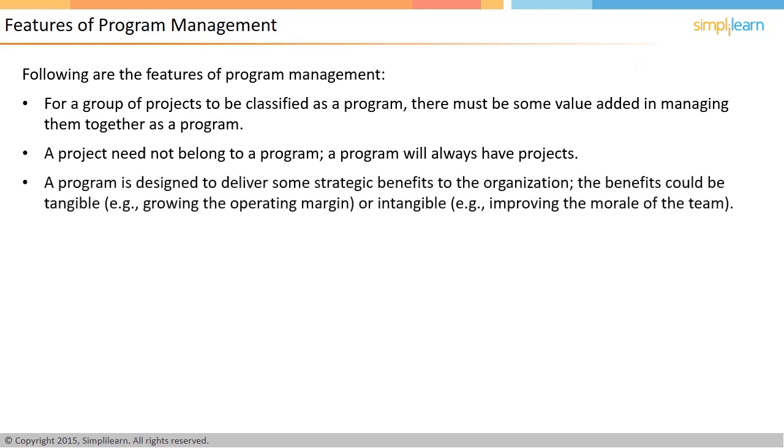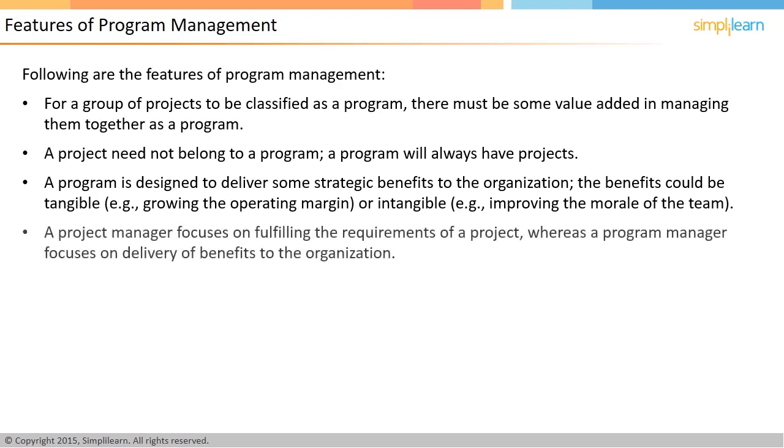A program is designed to deliver some strategic benefits value to the organization. These benefits can be tangible or intangible. Examples of tangible benefit could be increased profit margins or operational cost savings. Examples of intangible benefits could be improved team morale or building up certain competencies. While a project manager focuses relentlessly on the fulfillment of the project's requirements, that is, scope, cost, time, quality, a program manager needs to focus on ensuring that the organizational benefits are realized.